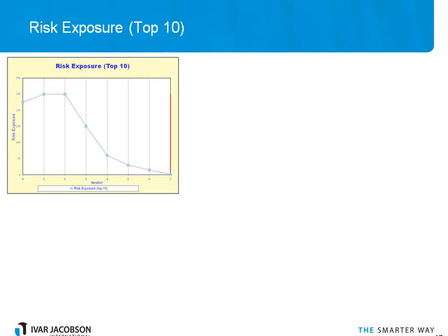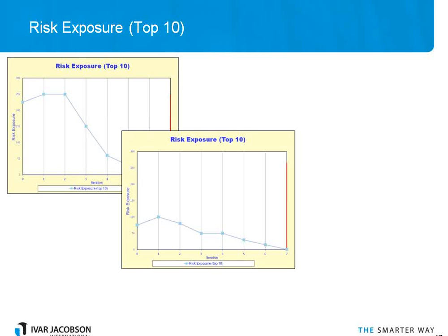The classic risk profile for an iterative project is in the early iterations we practice very aggressive risk mitigation. So we identify our biggest risks and we do something about them, and within a few iterations we can bring the risk exposure under control, and that's the point where you can do things like verify your commitments and expect to produce production quality code every iteration, etc.